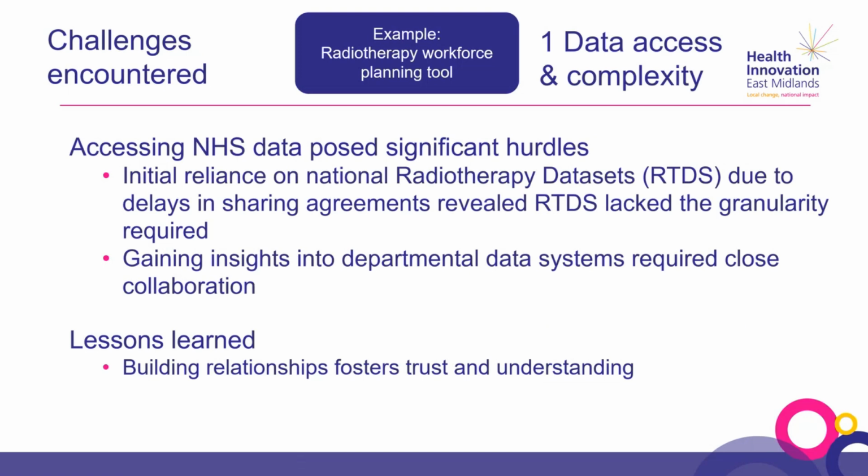Some of the main challenges: accessing NHS data posed significant hurdles. Initial reliance on national radiotherapy datasets, the RTDS, due to delays in data sharing agreements, revealed that the data lacked the granularity required. So gaining insights into departmental data systems required close collaboration.